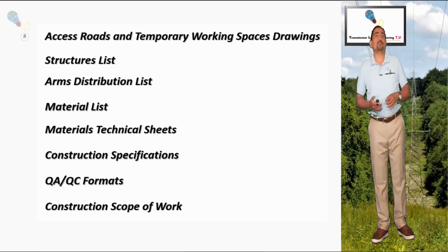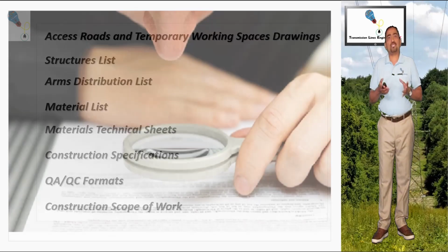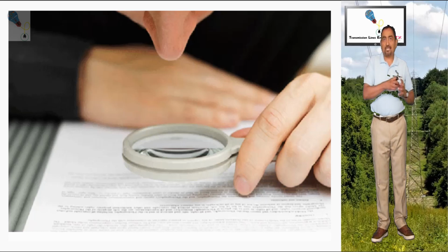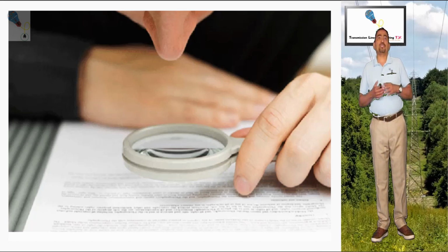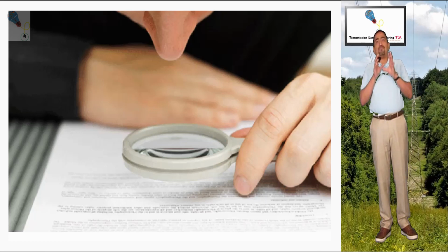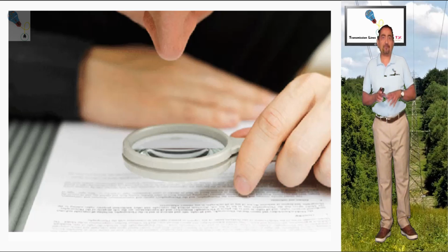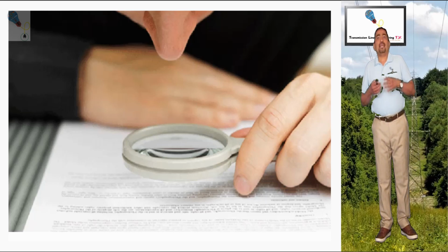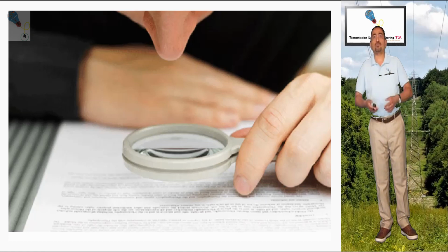scope of work document. So this package should be reviewed not only by the engineering area, but by other areas such as construction, quality, environment, and contracts administration. As step number 16, once the final revision package is finished, it is sent to the client for its last revision before proceeding with the construction. In the same way, final modifications can be received for its construction.